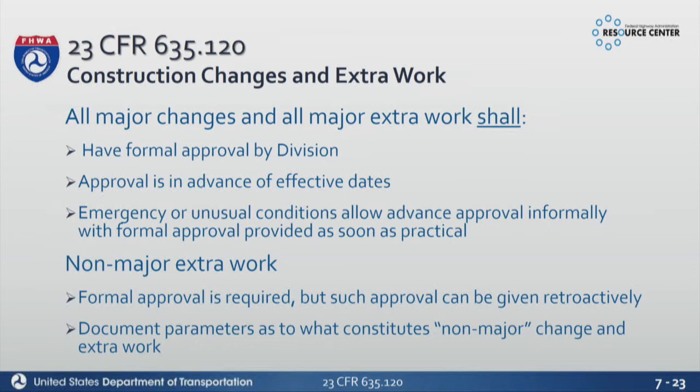So we've basically let the states assume that responsibility on our behalf. So you all get to decide when a major change is approved and when a non-major change is approved. But when it's approved, if it's a major change, you have to make sure that we have authorization in FEMAS before you start work on that, because that's what the rules say.